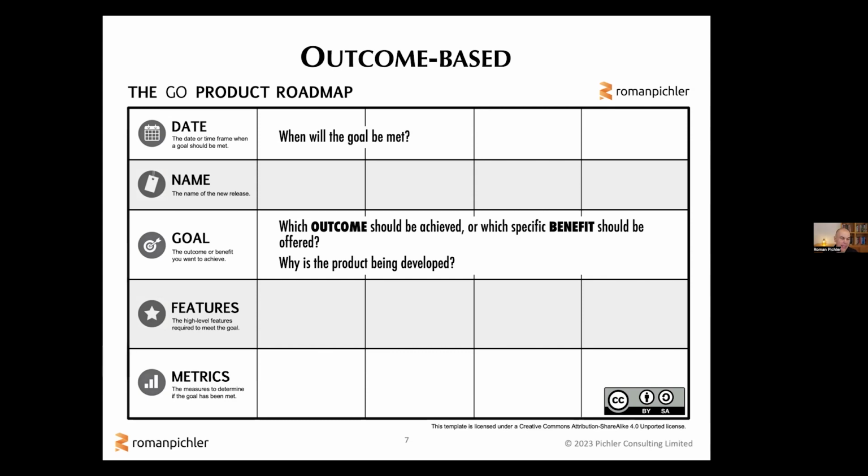If you create a public roadmap that is communicated to customers and clients, that is externally visible, then I would recommend that you do not use any specific dates, but rather big, coarse-grained, loose timeframes, for instance, in the first half of 2024 and in the second half of 2024. But if you build a product roadmap for an internal audience, for development teams and stakeholders, then I would recommend that you include dates or specific timeframes.